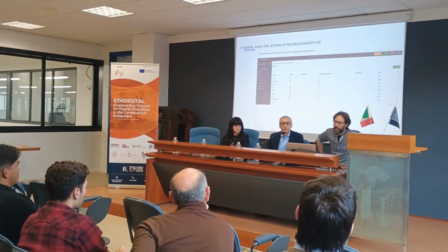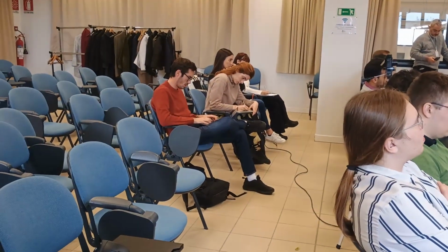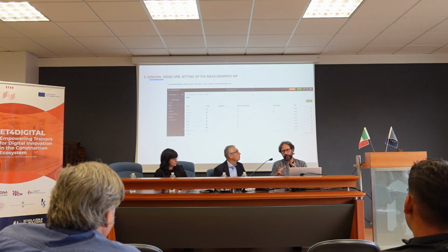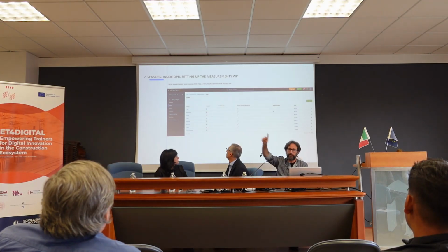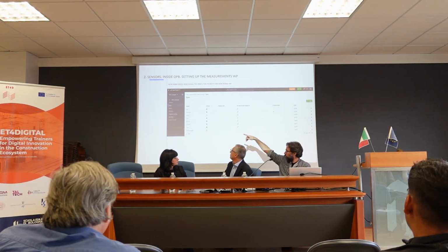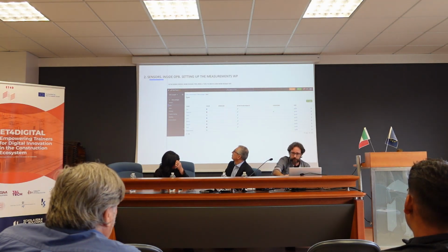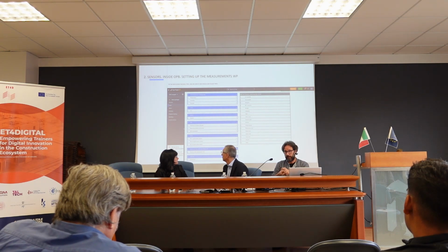And point number two, the sensors. We started setting up OpenProject BIM for having a new kind of work package. We call this kind of package measurement. It's a customized new kind of work package, down there, measurement. It's very easy. You just go to types of work packages and you add one with the plus sign, and then you simply define the features of this new class.